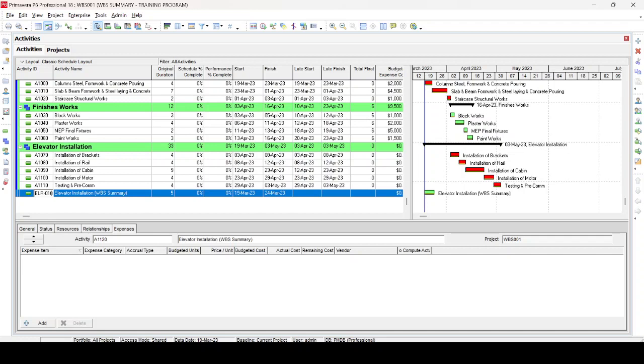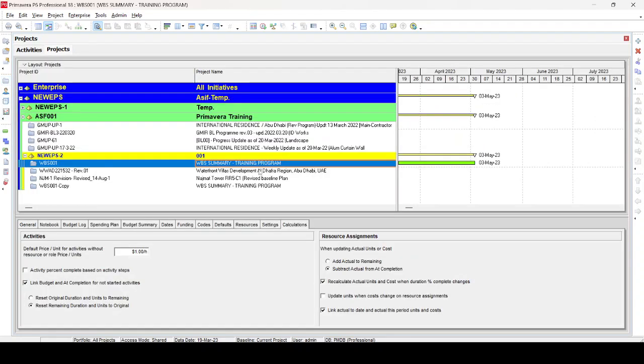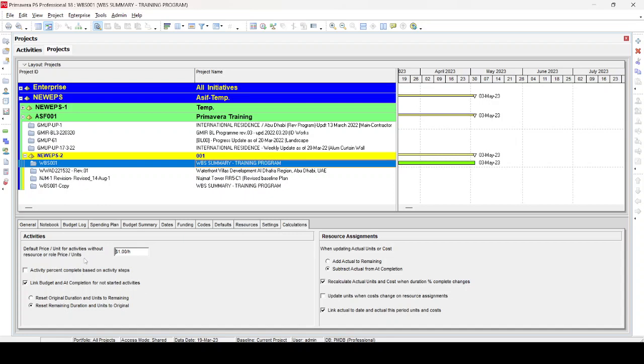It is very helpful for future reference and monitoring. Now we have assigned this WBS ID and this activity name. You can see here that it starts from 19 March to 24 March and is not expanding over the whole duration of the WBS. Before doing this, we go to project EPS and select this activity and make this WBS as $1 per hour. The normal rate is zero, so just make it one. Then make sure that subtract actual from at completion and recalculate actual unit and cost when duration percent complete changes, both options should be selected. Default price per unit for activities without resources should be $1.